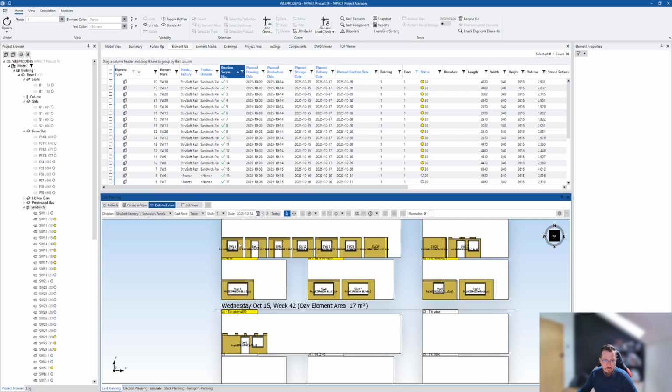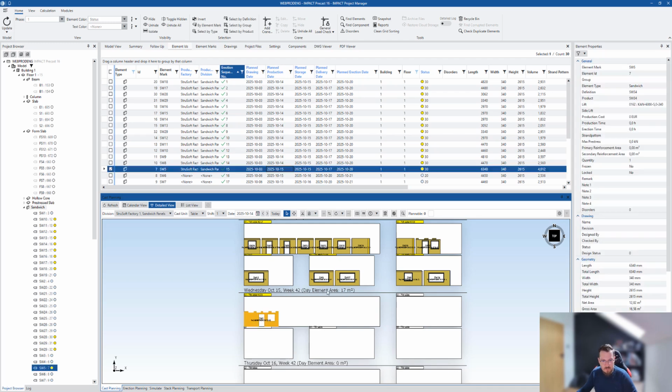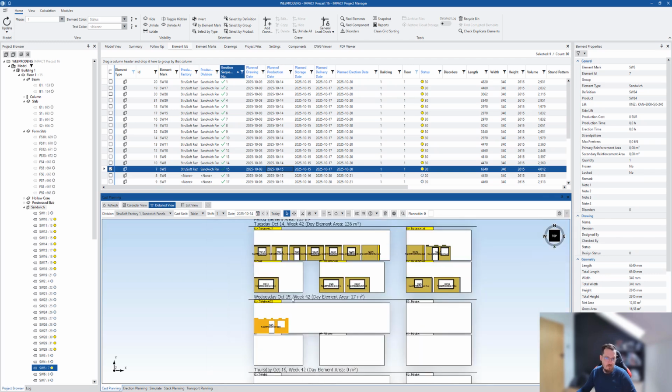So we've had 15 walls, there's 15 walls for sure, and there's one full bed. And this one seems pretty empty, but simply put, this element couldn't fit in there. Again, we specified an order in which the elements were placed, and this one simply ran out of space, and it was placed on October the 15th.